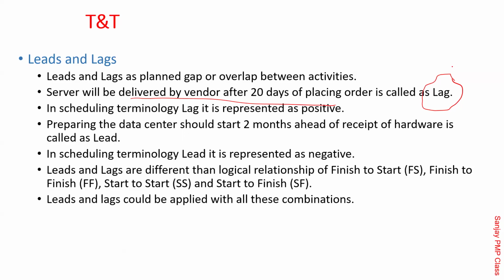Now these are linked to them. Now there is a gap of 20 days. Ordering is one activity, and receiving is another. You placed the order, but the delivery won't come the same day. Correct, Shishir? So you need to keep that 20 days of gap there.